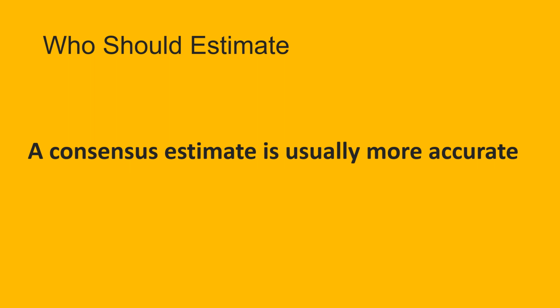Tasks can still be misestimated, but you should find that you have fewer unforeseen problems that could have been avoided by having the right people looking at it during the sprint planning. Remember, part of the sprint planning is to decompose stories into tasks for the sprint backlog and add an additional task to ensure that the user stories meet the definition of done. You are more likely to get this right when all the players are involved.